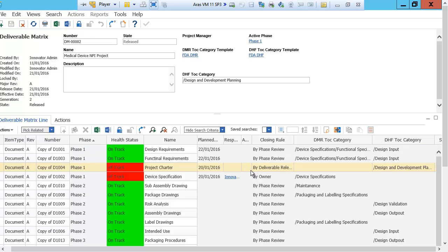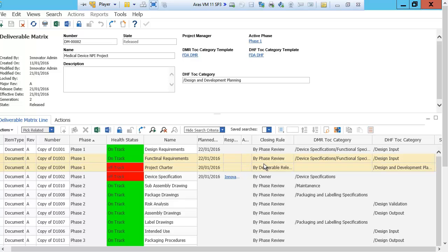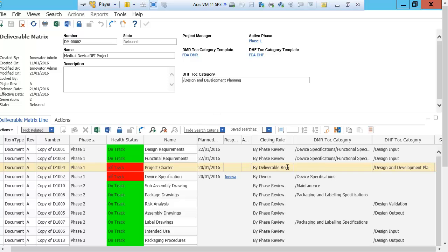Looking at this deliverable matrix, I see that there are two items that are off track. One of them being the project charter. I also see that its completion rule is based upon the release of the deliverable. Meaning that when the deliverable gets released, the deliverable line item itself will get set to a complete status. In this case, the project charter is a document and will get placed in the design and development planning section of the DHF.